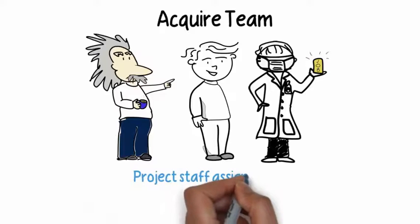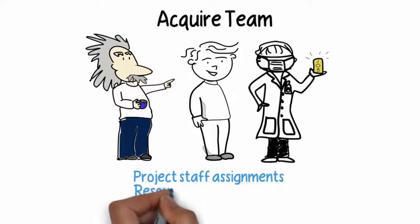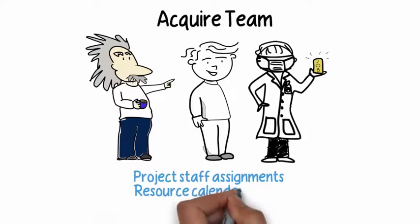Your outputs for the acquire team process are your project staff assignments, your resource calendars, and updates to your plans accordingly wherever necessary.